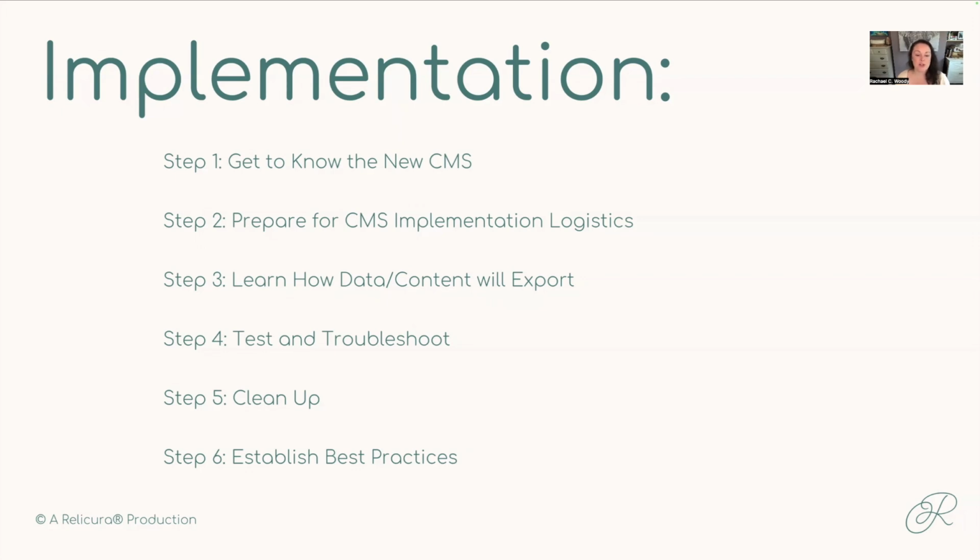Step 3, learn how data and content will export. So export from your old system, but we're also going to need to think about what that import piece looks like and what format and shape your export needs to be in for that future import.